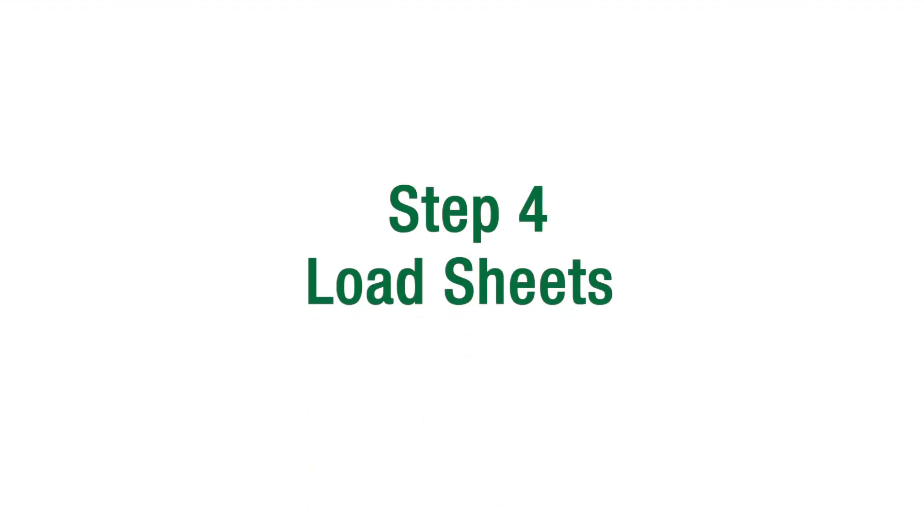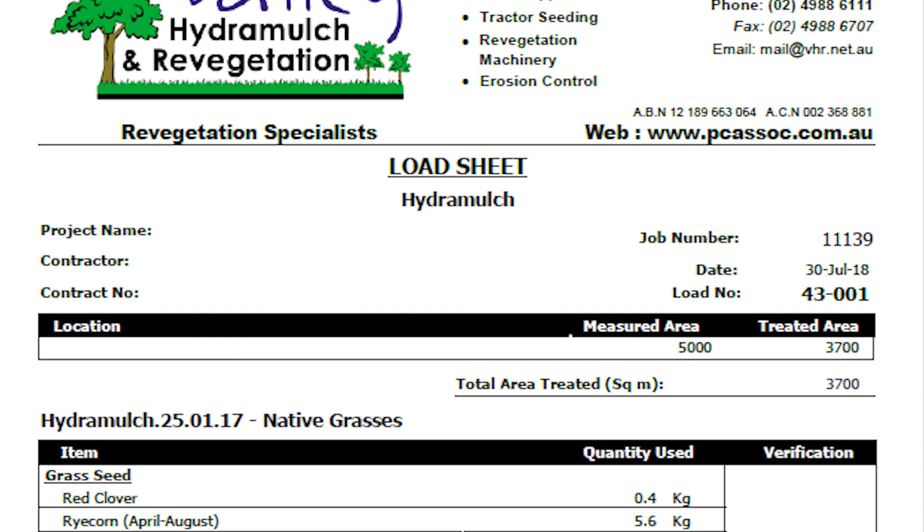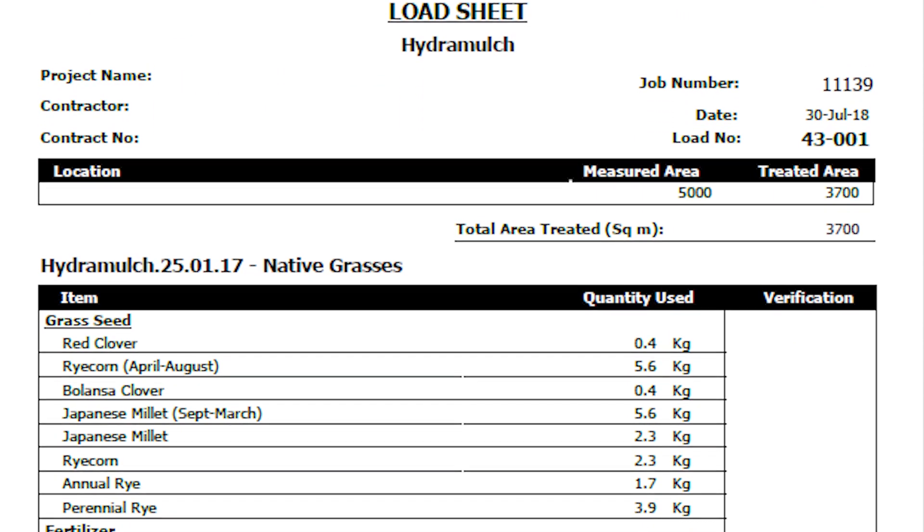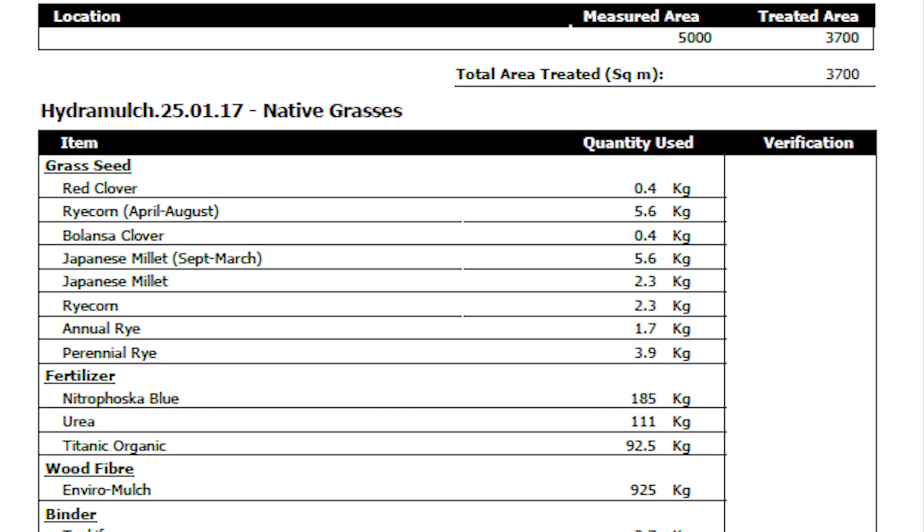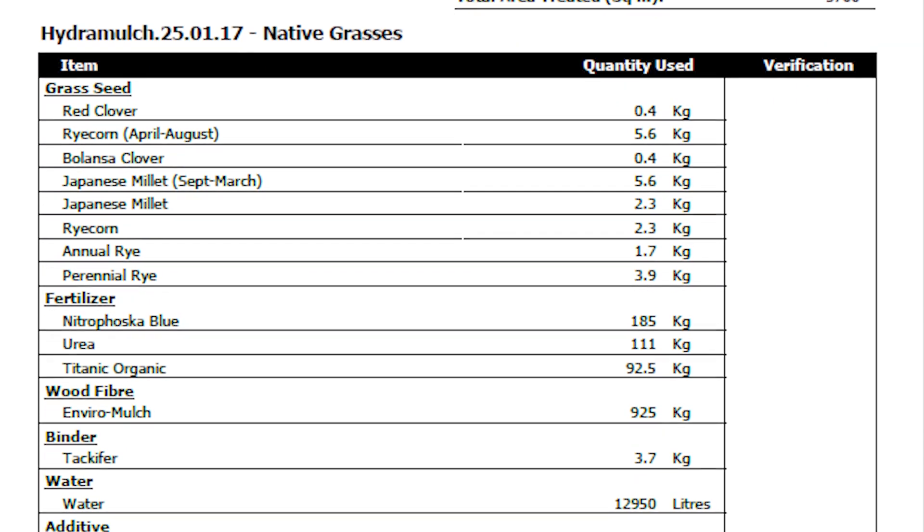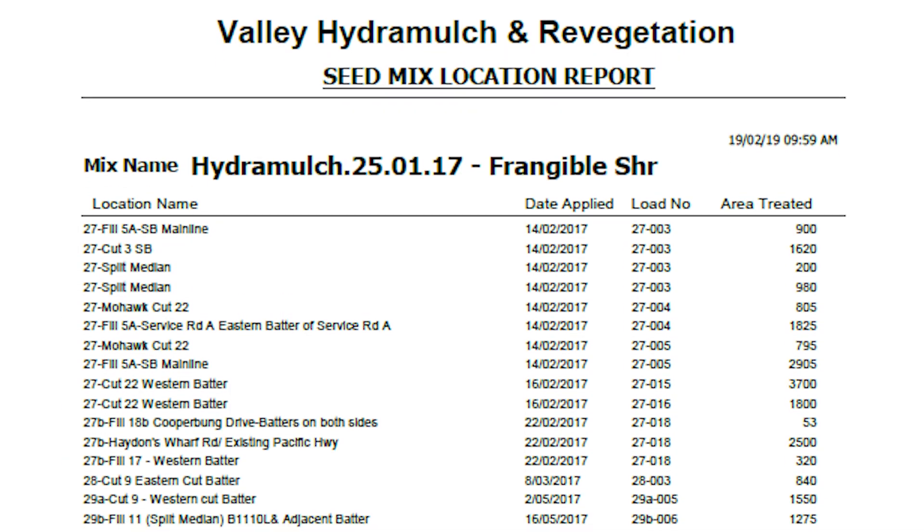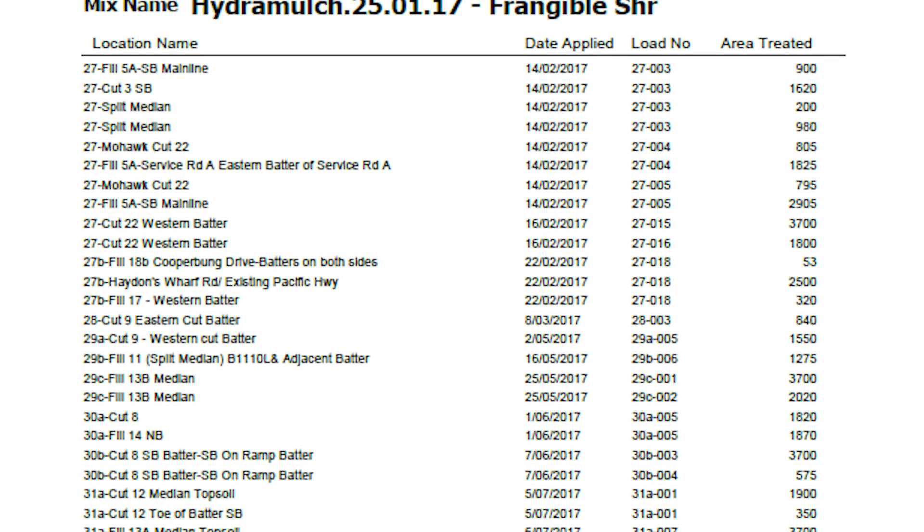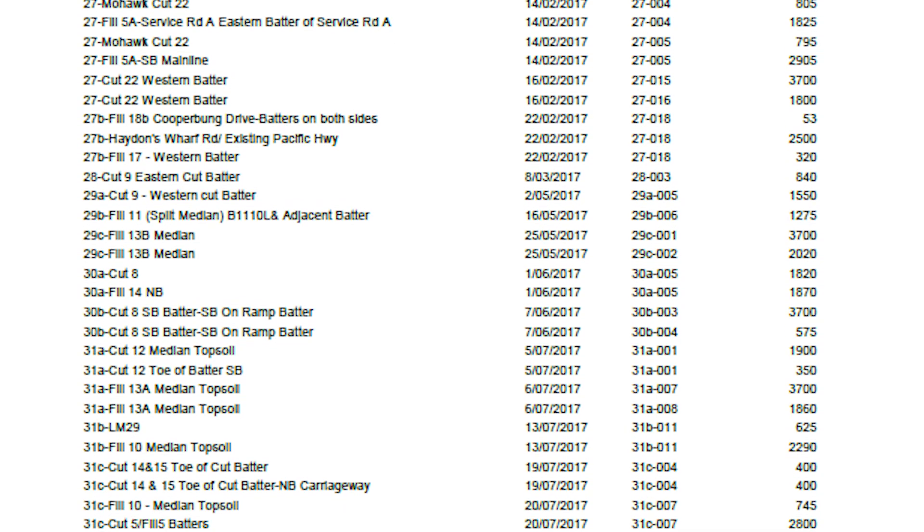Step 4: The sign off sheet is sent to our office for use in the development of application breakdowns called load sheets. These are then sent to the client with the invoice providing information on the exact quantities of each material used in each specific area.